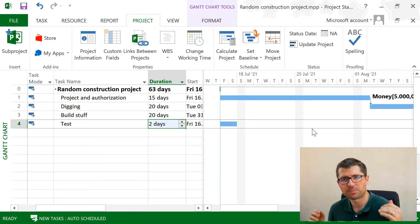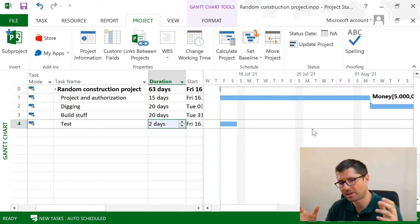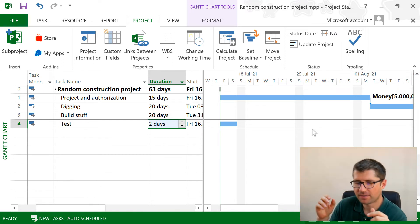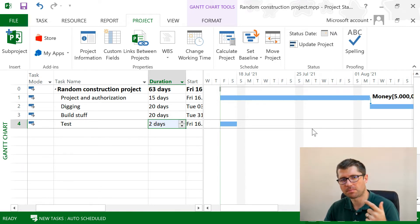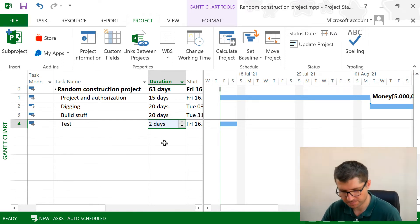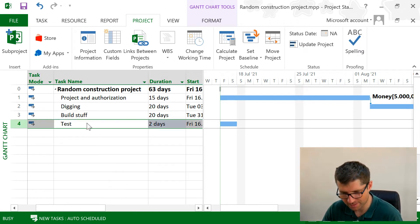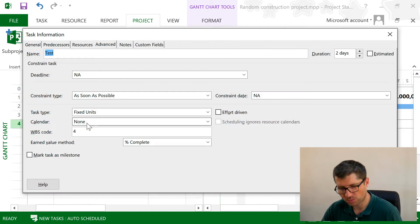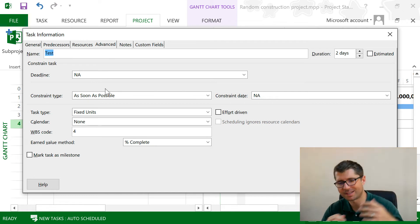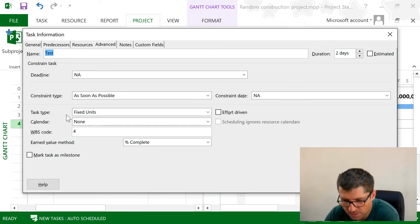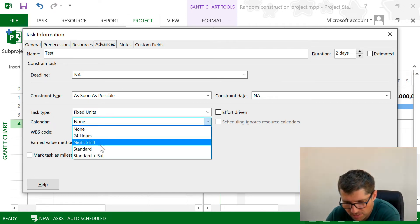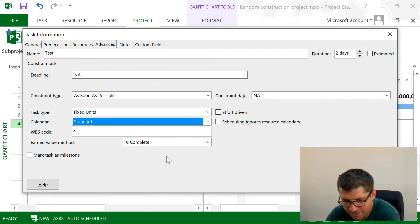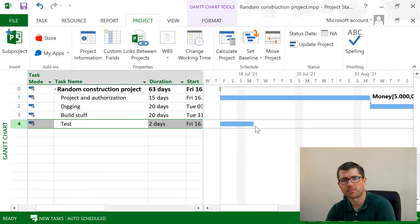Now the settings for these calendars and the way I use them with tasks are very granular. I mean, I can have a calendar for the entire project, but maybe I need this test to be on a different calendar, not the one with the Saturday. So I can use this and change it into the Standard one, and I will click OK and it will go until Monday.